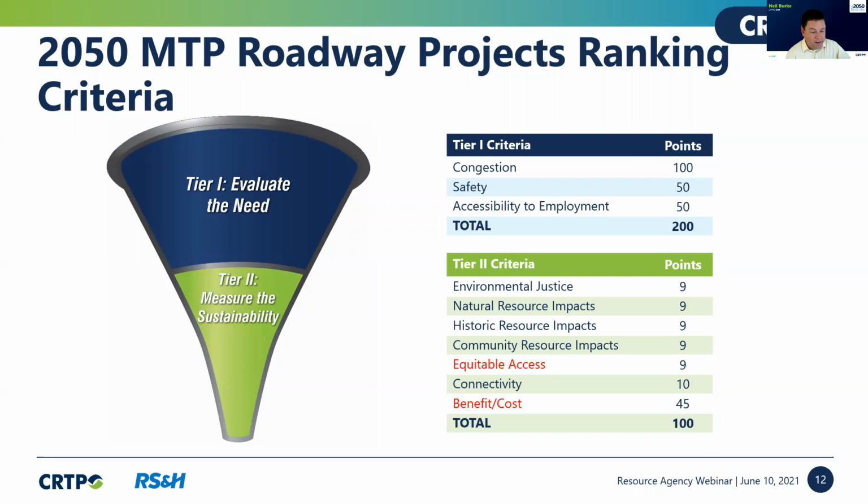That really identifies where the need for these funds is. Tier 1 is also consistent, not necessarily identical, to how NCDOT prioritizes projects in its prioritization process, but it's close. So we found that projects with a good Tier 1 score tend to fare well when we submit them to NCDOT for consideration of funding.